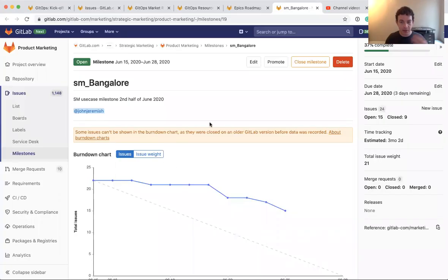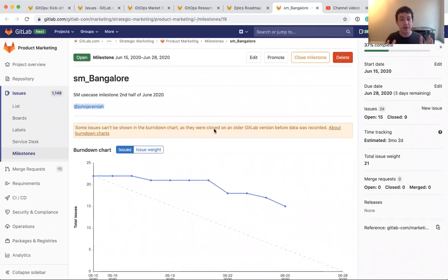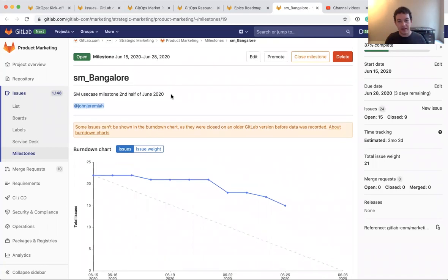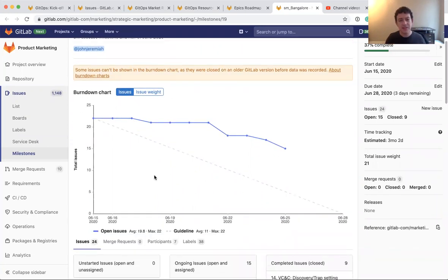So if we look here at a milestone, if you want to know about that, check out the previous video. But we know that a milestone is a particular period in time. Let's say these next 2 weeks, what am I going to get done between June 15th and June 28th? Whatever I think I can get done in that time period when I'm planning out my work, I add issues to that milestone. My team might add all of their team issues to this milestone, which is actually how this one works. And then we have this chart.